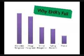Now, one of the things that I see most often is existing processes just being automated. This becomes a true issue when you have implemented the EHR and you're seeing your staff create workarounds to the EHR. What you've done is basically put in a system that just automated broken processes. So the planning up front with workflow redesign helps you to create efficient and effective processes and then use the EHR within those processes.